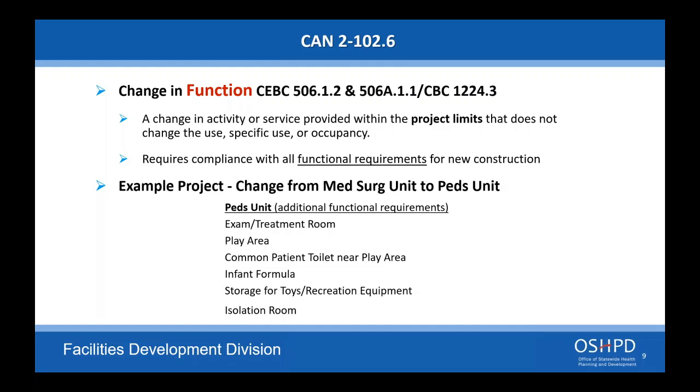I think maybe that's where you're going with this. You're renovating med surg to med surg. You're doing some remodels, but you're not touching the soiled utility room or clean utility room or nourishment room, and you want to reuse them. No further upgrades would be required to those rooms if they are not in the scope of the work.